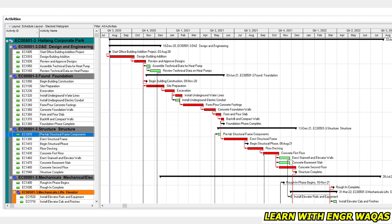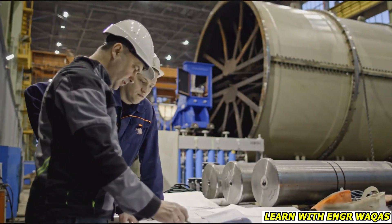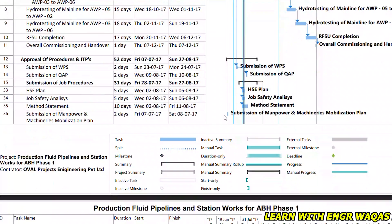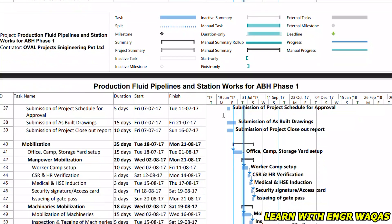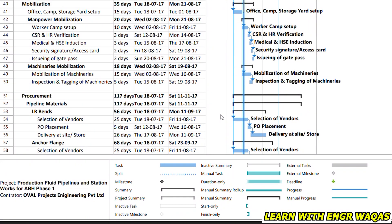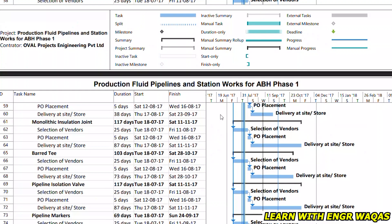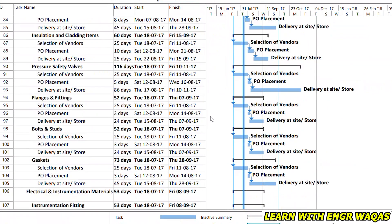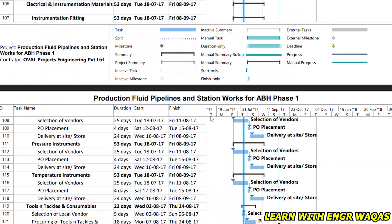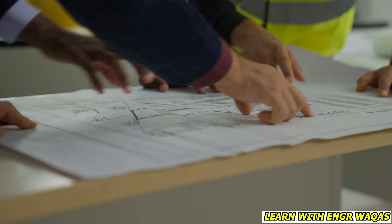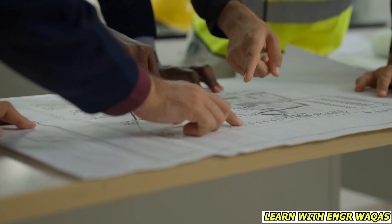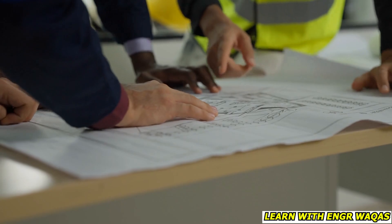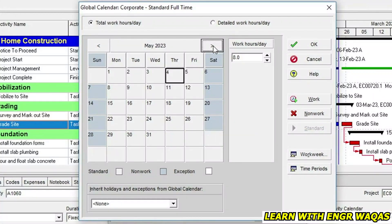Monitoring productivity in kilometers per day is essential. When setting up daily work, you need a productivity sheet where every activity is labeled with its productivity rate. This should be approved by the client and consultant. Based on this productivity, you evaluate and assign the duration for each activity.